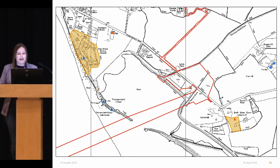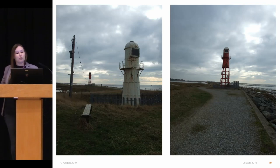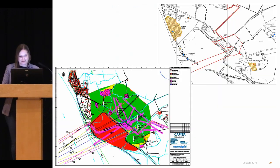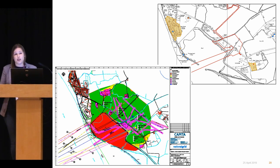I'd like to draw your attention to the two blue triangles on Thorn-Dumbled Clough, which are the Low Lighthouse and the High Lighthouse—both Grade II listed. Two of the tunnel route options passed underneath these lighthouses, and our key advice was not to tunnel underneath them because of the potential for impacts from vibration or from hydrological changes which might result in settlement, both of which could affect the historic fabric of the buildings. On the basis of this advice, two of the corridors were discounted.